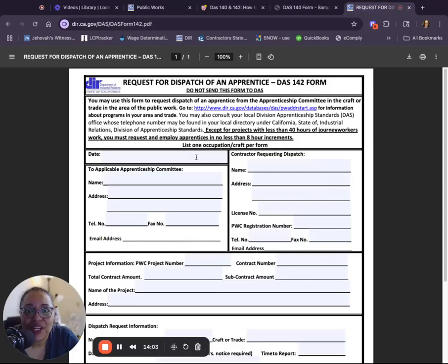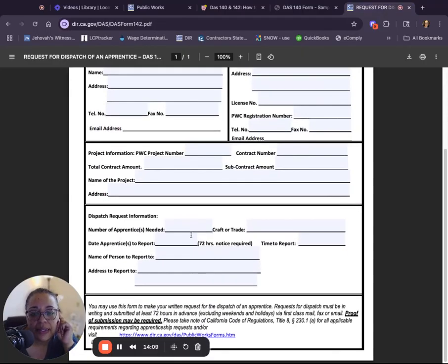But then you get to the 142, and in your head you're thinking 200, 200, 200. And it says number of apprentices needed, and you tell yourself, oh my gosh, we need 200 apprentices. No, you don't. That was hours. There's nothing on here that says hours. Why they try to confuse you like that, I have no idea. You're going to need one person. In all the 140s and 142s that I've sent out, when it comes to requesting an apprentice, it is rare that I'm asking for more than one. One apprentice. How many apprentices do you need? One.